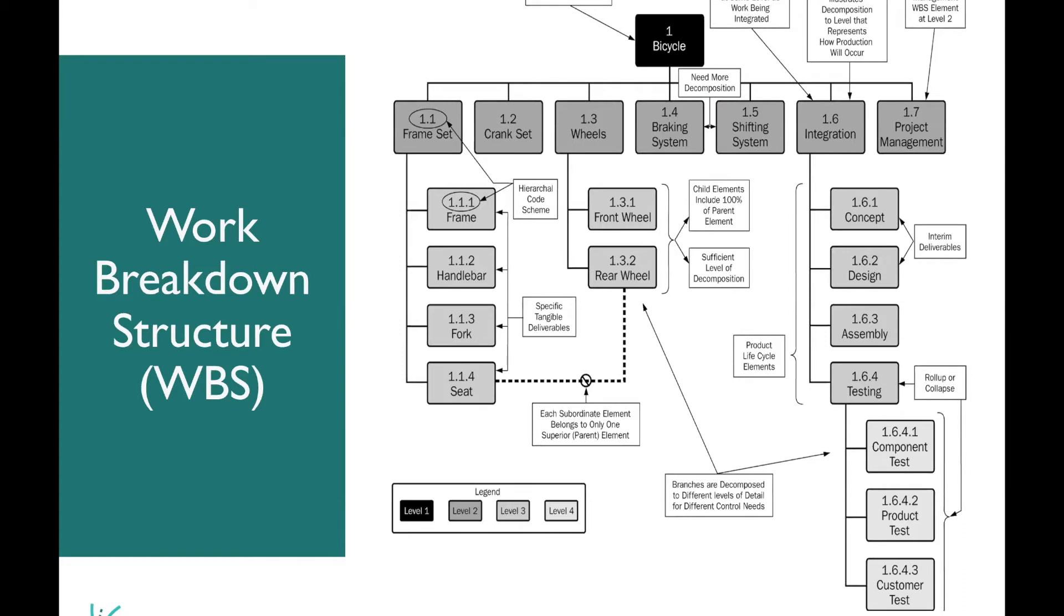However, this is a visual of one for building a bicycle. I want to draw your attention to the lowest level of this work breakdown structure. You will see that as part of testing, 1.6.4, we have that broken into three different work packages: component testing, product testing, and customer testing. This is the level at which you would want to come up with your duration and your cost estimates.